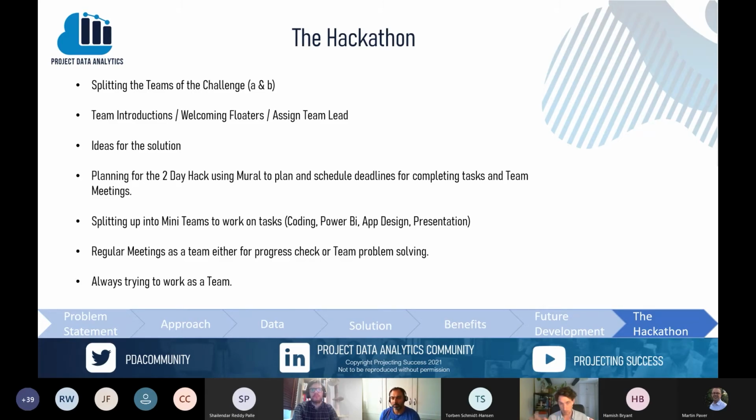Ours was Thursday, Friday. We started from Friday afternoon and worked back. Friday afternoon, we talked about what we were going to produce by a certain time. We worked back from there, and we set a schedule in place where we were having touch points every hour and a half, 2 hours, where we'd have a quick catch up, make sure we're all in the same direction, any problems were addressed. And we stuck to that plan. But the key to that was understanding what we were going to produce. And the key to that was understanding what was achievable.